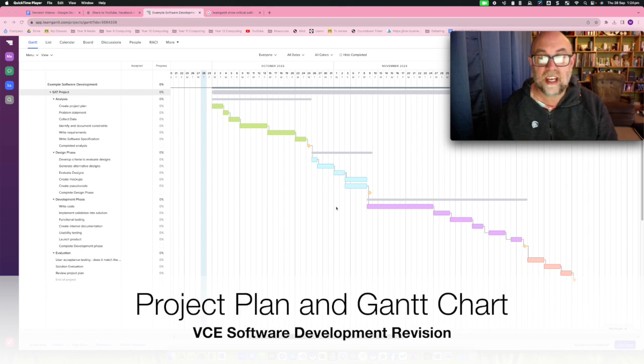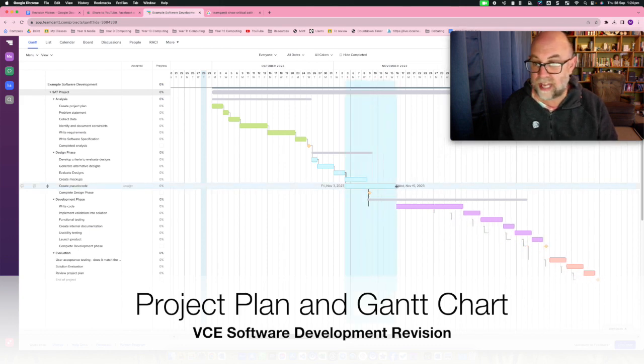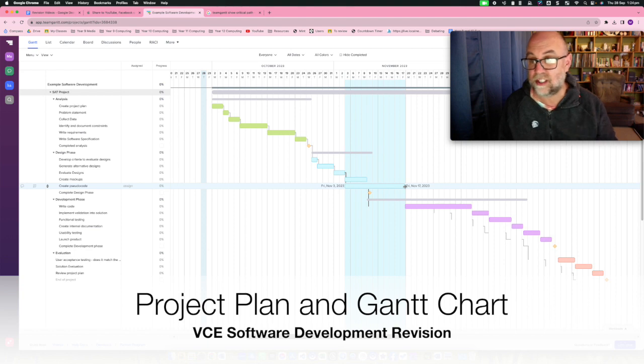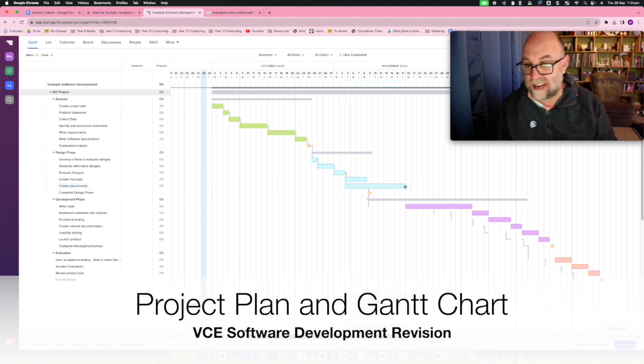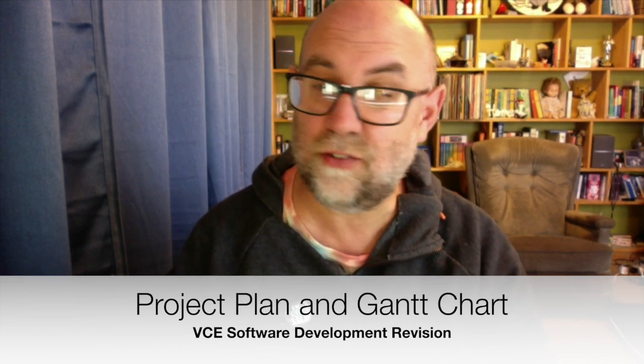If you were to move out one of these things — let's say creating the pseudocode moved out because somebody was sick or it was just more complicated — you'll notice that everything else moves out. So the critical path of the project actually gets longer. One common misconception in the practice exam was that the critical path only gives you the shortest path through the bare bones of the project if you leave out some of the features. But in actual fact the critical path is for the scope that we have.